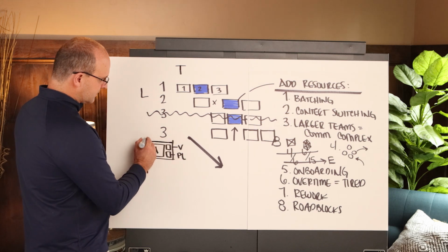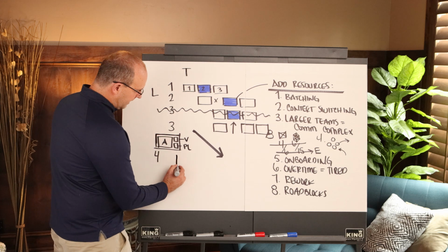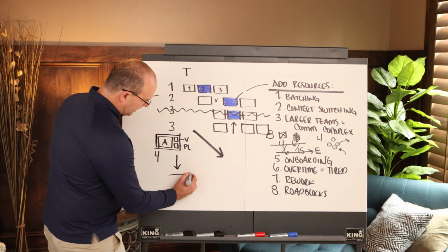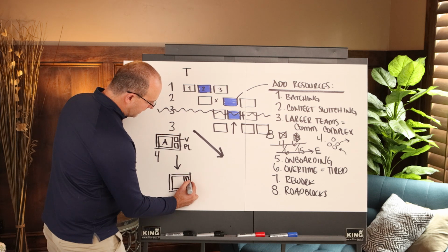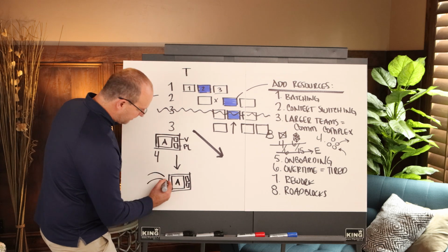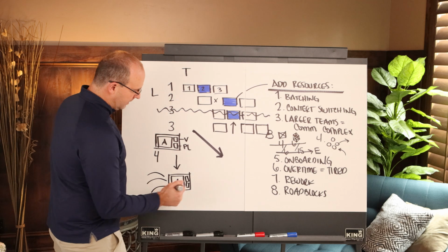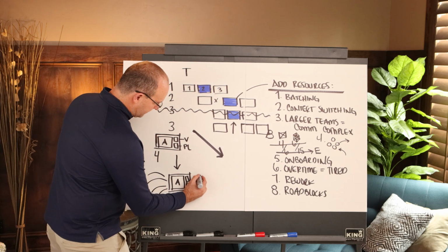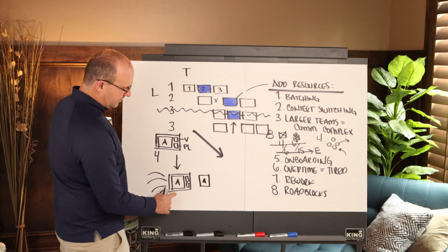This is a representation of what happens. So check this out, everybody. If you're like, hey, I've got a task and I want it to go faster, and this is my activity time, and I've got a small amount of variation and a small amount of productivity loss, I'm going to go add people to it, add labor, because I'm doing this trade burdening. And you're like, of course, Jason, the activity time gets smaller, right? You can see that this box is smaller than this.